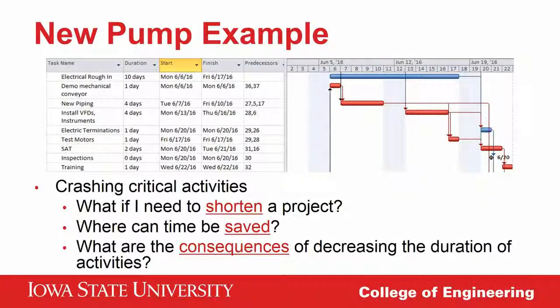So that's 500,000 pounds of missed production. In round numbers, the profit of this material is about 20 cents per pound, so $100,000 lost. Armed with this information, it's time for me to get to work.